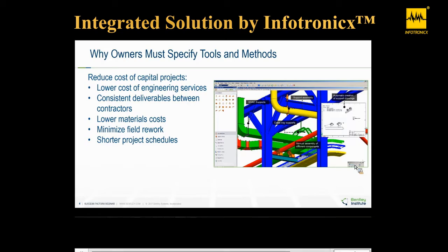That same material data captured to support procurement will help in operations and maintenance if we're able to bring this information into our plant records, complete with part numbers and tied to storehouse and spares. Clash management and design reviews earlier in a project minimize the field rework and involve operations and maintenance long before the designs are final. And the results are clear on this one. The technology saves engineering cost, construction and material cost, and shortens schedules. This lets owners begin plant production earlier.